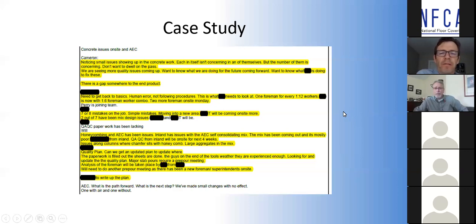Yeah, and setting the ball rolling in the right direction at the beginning. In this particular case, the flooring installer was asked to submit bids 6 months after the concrete had started. So concrete was already bad before the flooring people actually walked on site, and the constructor said, what are you going to do to fix that? And the flooring installer basically said, till you fix the concrete, there's nothing we're going to do.